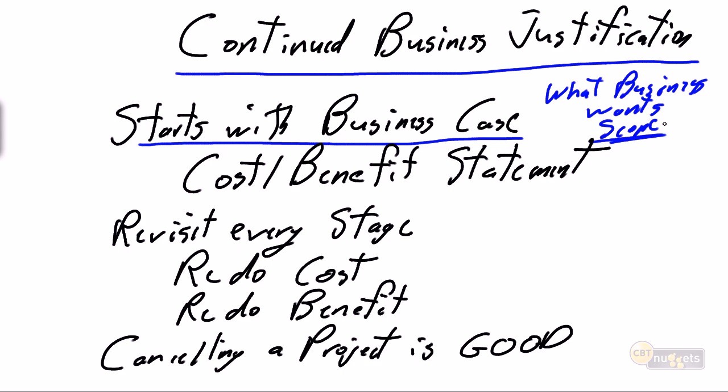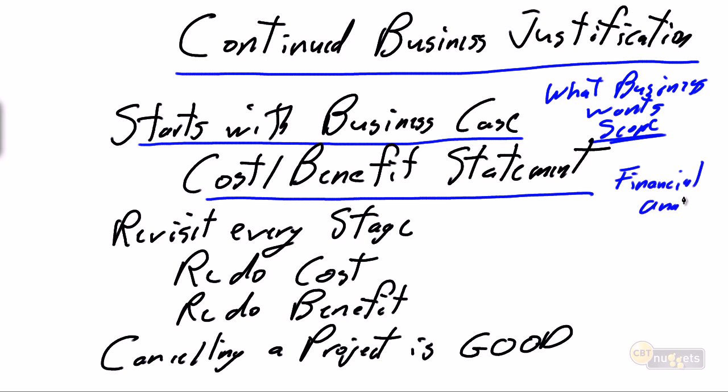But the most important aspect of that business case specific to this principle is that the business case contains the cost-benefit analysis. And this needs to be a comprehensive cost-benefit analysis. Unlike that very simplistic example that I gave in my introduction, whereby if it's a $50,000 or $5,000 project, and we have a $1,000 annual payback over 5 years, the project is justified. Now, cost-benefit justification is much more complex than that, and we typically will need to get into full financial analysis.